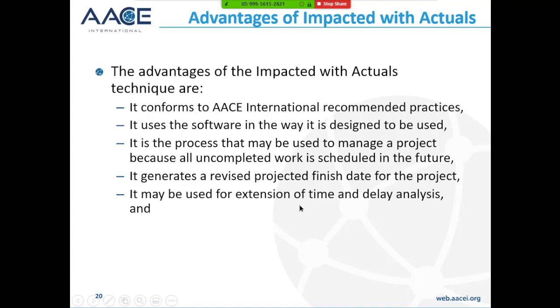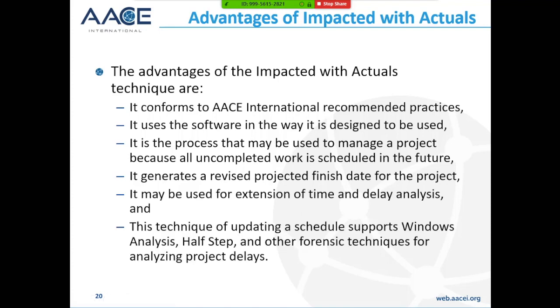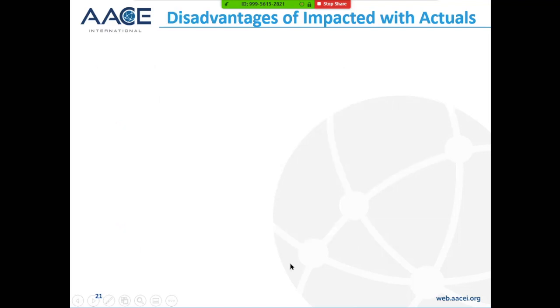It may be used for extensions of time and delay analysis, and this technique for updating the schedule supports window analysis, half step, and other forensic techniques used to analyze project delays. So there's many advantages of using this.